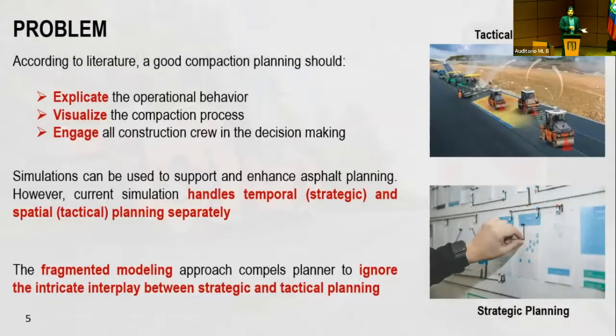We talked to these paving planners, and we noticed that they normally have a planner sitting in the office trying to decide what would be the best logistic strategy for this particular project. So they come up with the required number of trucks, the best asphalt plan for that specific project, and in what frequency the trucks need to be sent off.